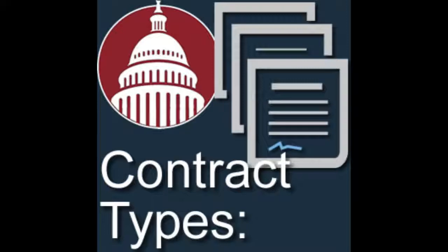So what a contracting officer may end up doing is having a contract line item that's cost for travel. And that way, you're not getting any profit on it, so it's straight cost, but that's an example of something where it makes sense to do cost. Yeah, no risk for you. No matter what it costs, you'll get reimbursed for the flight. Provided you have funding on the contract. Yeah, right. That's another story.